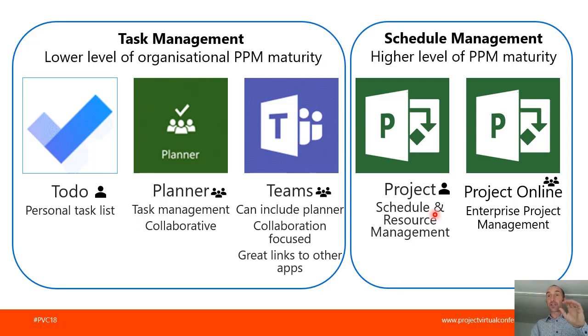So not only am I concerned about what tasks need to be done, but then I say that the tasks have dependencies and relationships between each other. So if I'm going to do task 1, then once I've done task 1, I can do task 2. And once I've done task 2, I can do task 3. And once I've started task 3, I can start task 4. And once I've finished both task 3 and task 4, then I have a milestone. So we're creating much more of a schedule of when we need to do the tasks in a tool such as Microsoft Project. So that's what I mean by schedule management.